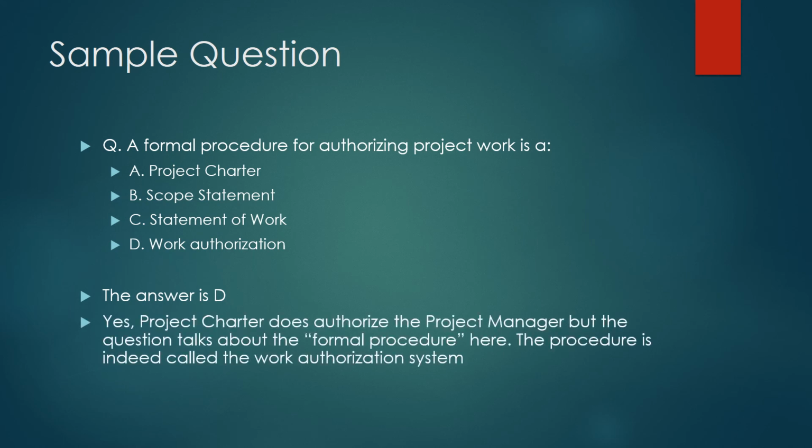The project charter does authorize the project manager, but the question talks about the formal procedure here. So we're talking about the procedure. We're not talking about a document that authorizes the project manager. The procedure is indeed known as the work authorization system, and that is why the answer to this question is D, work authorization, and not A, project charter.